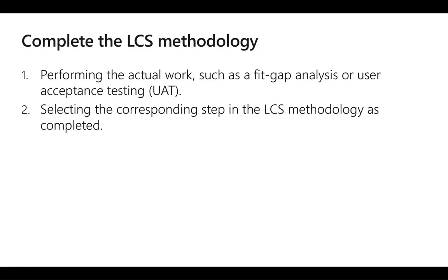The process of completing a step has two parts. One, performing the actual work, such as fit gap analysis or user acceptance testing, UAT. Two, selecting the corresponding step in the Lifecycle Services methodology as completed.